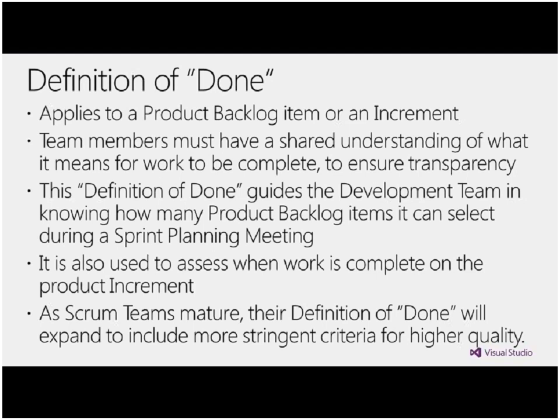So Scrum, and so do the other Agile methodologies, some more than the others, make it a clear prerequisite for you to work on anything. You've got to have some criteria of done attached to it, right? So this is something that is important to understand. The definition of done is the way that you evaluate that increment that's being delivered. So therefore, it's got to be recorded somehow in the system, and product owners have to have access to it at all times, and they have to be able to access it at the moment that they're doing the sprint review or the increment review.